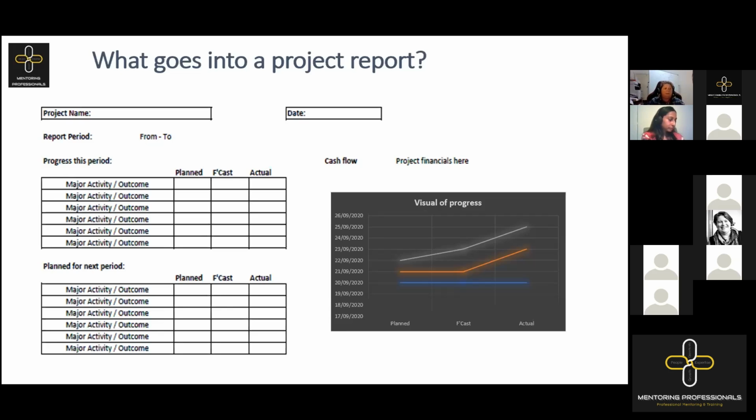If you're working in a PMP environment, they're going to be looking very specifically at your project charter. If you're working in an agile environment like Agile PM, they're going to be looking very specifically at your management approach definition, because all of those will contain how you're going to control your project, what those project controls are, how you're going to manage the project, what procedures you need to use, what tools you need to use, when you need to report, and what, of course, goes into those reports. And then you need to coach and mentor them, because they don't necessarily have a clue.